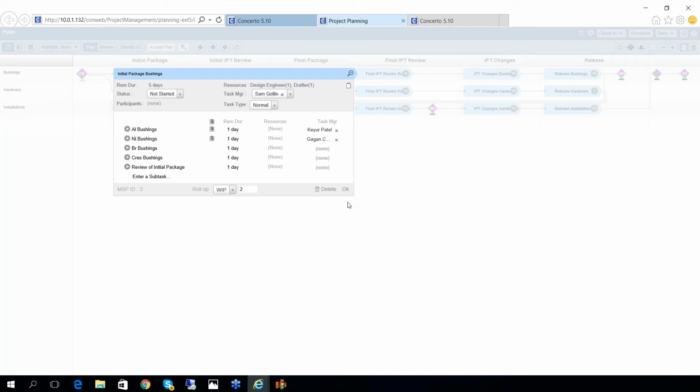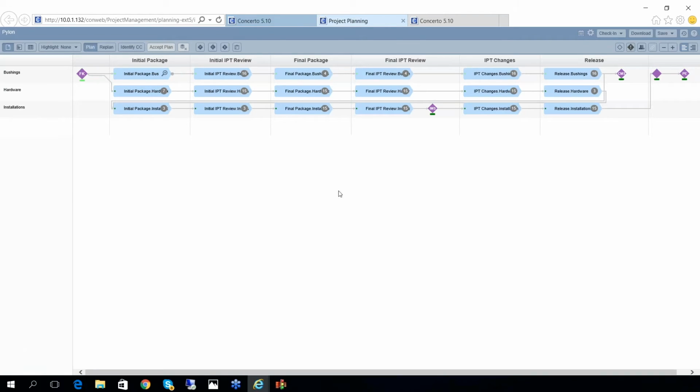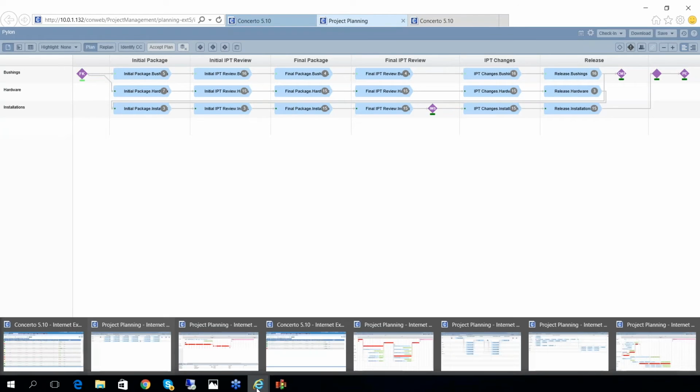When they tell us how long these tasks will take, the software can calculate, for example, what is the impact on the overall task duration, but we don't take that information automatically into the remaining duration update of the higher level task. So this is one example of how we have collapsed the details and contained them locally inside a task. Another example I want to show you here is the full kitting.